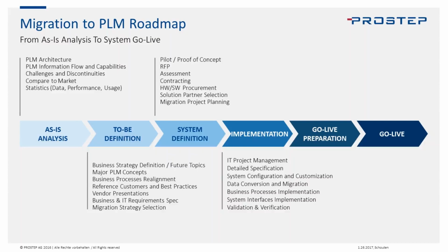And then following implementation, doing the configuration and customization, aligning your third-party integrations, ERP, MRP, other types of integrations, and then implementation of data conversion and migration tools, followed by user acceptance testing, training, migration dry runs, migration rehearsals, and rollout.